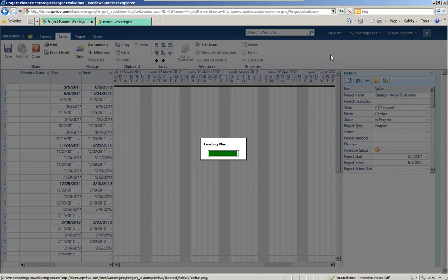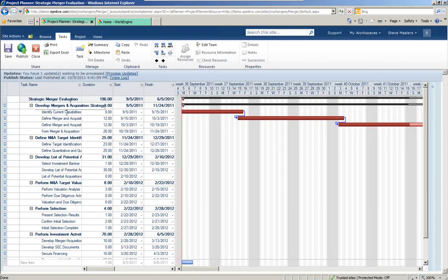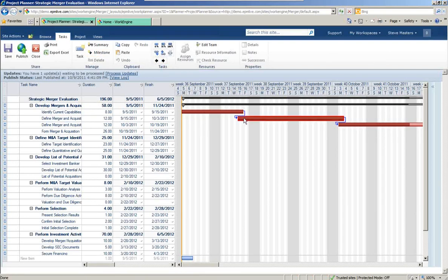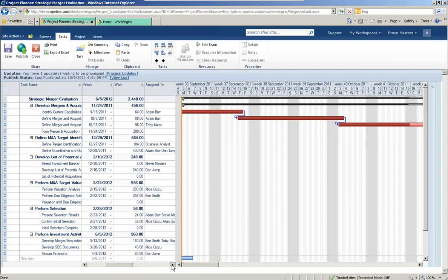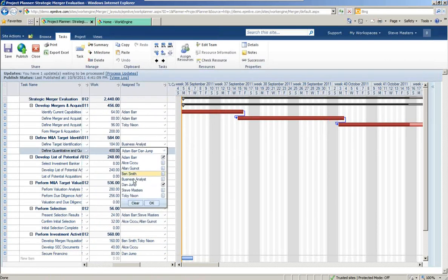You can build an online plan, put milestone items in, put dependencies of all types in, and assign resources of various types, putting workloads and resource assignments based upon project teams that are put together from your central resource pool. All of the basics that you would do in Microsoft Project are being done here, and then the resultant information is published and made available for SharePoint.